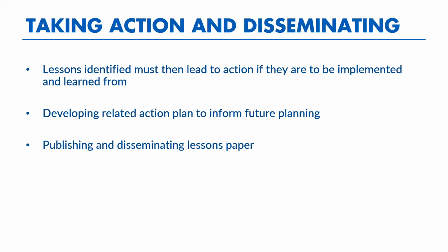But I think an action plan is actually more important if you're doing project reviews during the project. And this is where you develop the action plan and include, number one, the actions that are to be taken, who is responsible for implementing these, and two, then this allows you to monitor progress of implementation and, of course, the timelines for implementing some of these actions. So I think an action plan is much, much more important for interim project reviews as opposed to future projects.